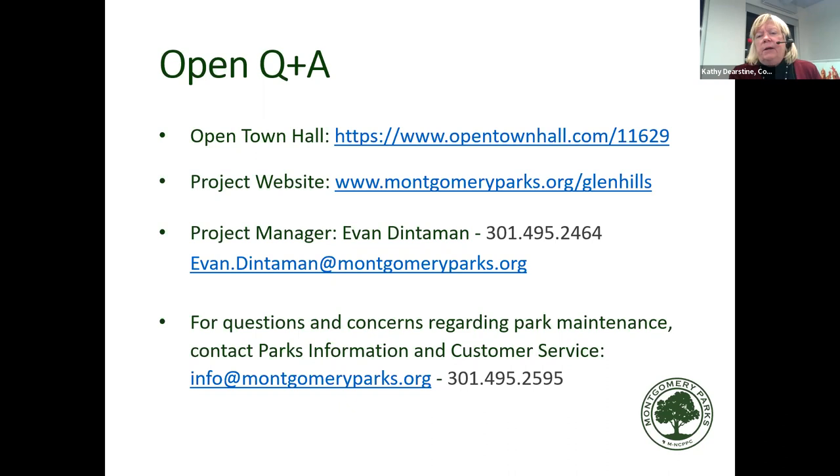A whole playground, I've been doing some structures on a couple playgrounds down county here, and I can do the whole playground for $100,000 or less. So that's just the equipment to give you an idea. But it's about double that for the installation, right? So when you spend about $100,000 on the equipment, it's about $200,000 overall for the surfacing, the drainage, the install, right? It's about double.